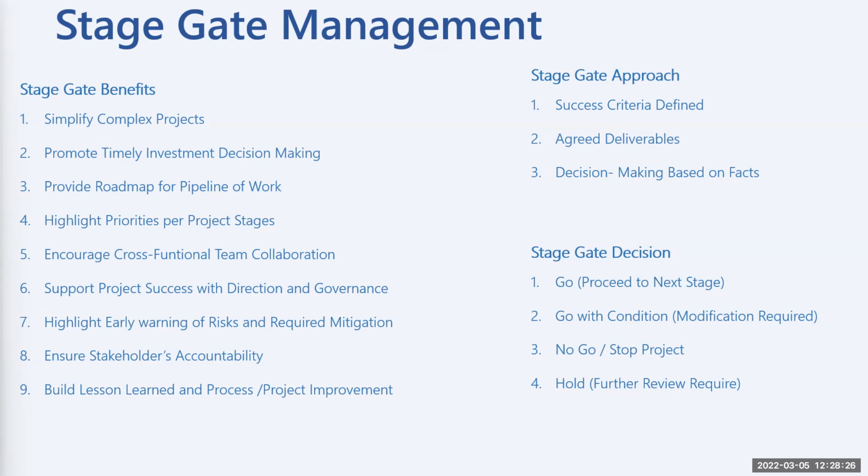Those deliverables need to have been delivered before you can say, yeah, your project needs to come to stage gate. And PMO coordinates all of these activities to say, okay, what are the projects? There are so many things that could be used. It could be the project plan, it could be the budgeting, and even the deliverables. There are key things that need to have happened at each phase of that project. So they have a deliverable tracker to make sure that these deliverables are being tracked. So they say, okay, this deliverable needs to be delivered in the next 20 days. And they are tracking it to make sure that there is an understanding of the progress on the deliverables.